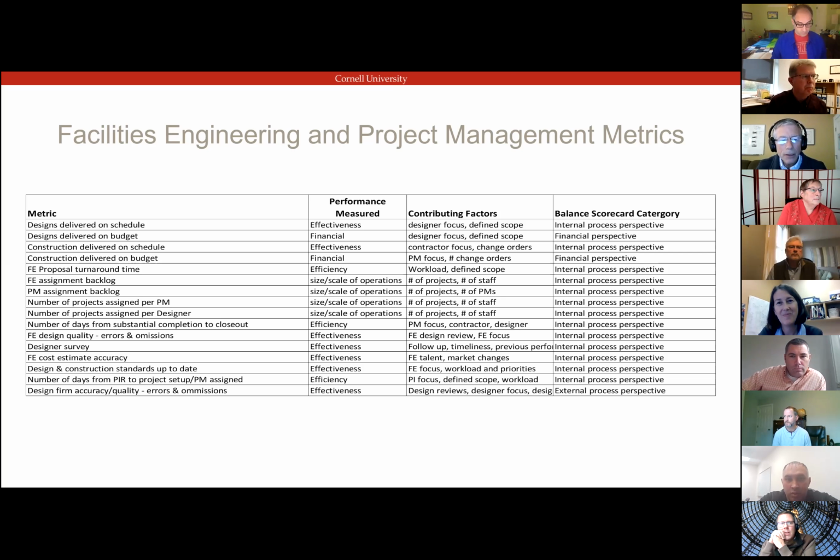Okay. Do you ever have a range, maybe instead of the number of change orders, the percentage of the change order increase? That's something that's cost growth. Typically, once you've awarded a contract, Jason, you would track the cost growth from the contract.